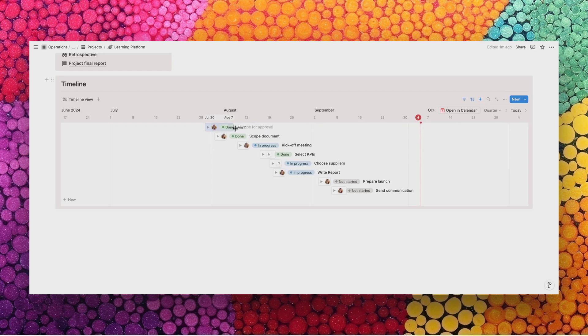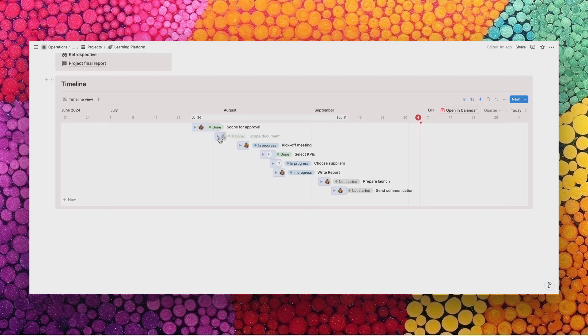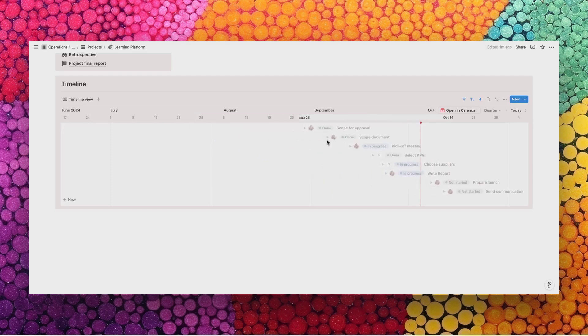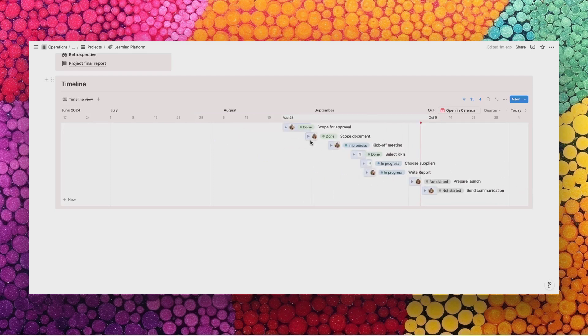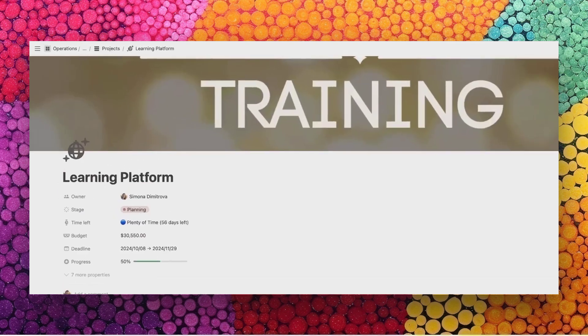If you want to remove several tasks at the same time, you can select them putting your cursor at the right of the table, outside the table area. You can delete them using the delete button of your keyboard. You can also move them. If you have to postpone the project with a month you can simply select all timeline tasks and drag them to the new date. That was the overview of the large project portal.